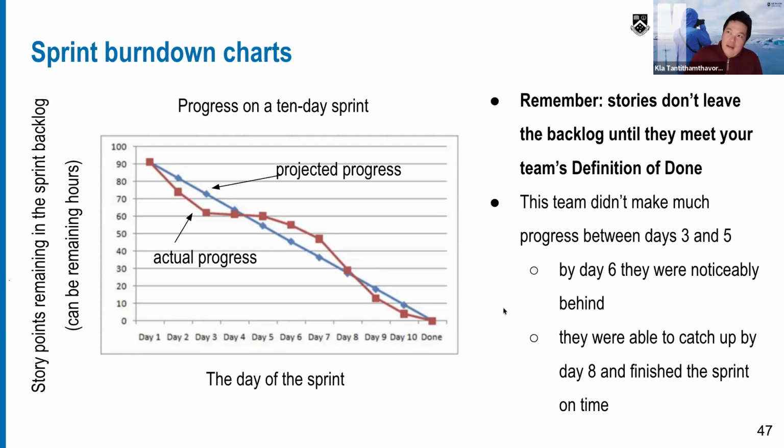For example, I have a feature, addition in the calculator application. I told my manager, hey, boss, I completed the add button already. 1 + 1 = 2. I tested it already. Done. I completed it. And then it's not considered as complete. Let's assume that the definition of done says that the add button should be placed here so that users can use it easily, like a user friendly UI. I placed it at the wrong place, so it's not considered done.